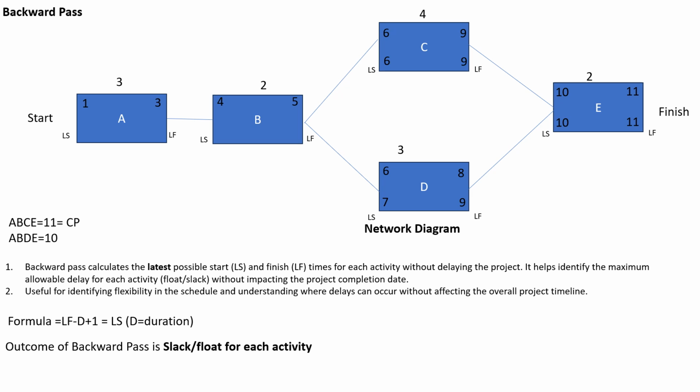Similarly, when we go to activity B, the late finish would be 5, because the next activity will start on day 6 only. That means activity B has to be completed by day 5, or in another way we can say that activity B will take the complete 5th day to finish. Then we have the formula and we have this late start.